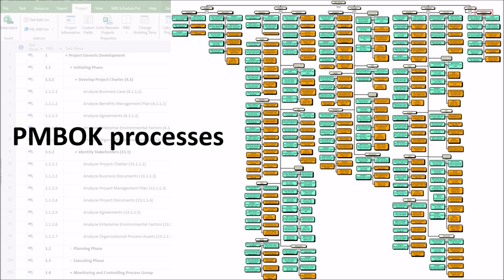We have already seen that we must include 100% of the work required to achieve the goal. In other words, regardless of whether it is a simple birthday party project or a building construction project, we will have to include all the work required to identify the stakeholders. One of the tasks to be carried out in stakeholder identification is to list the people involved in the project. So, let's list the people involved in both projects and get an estimate of the hours needed to complete the task.